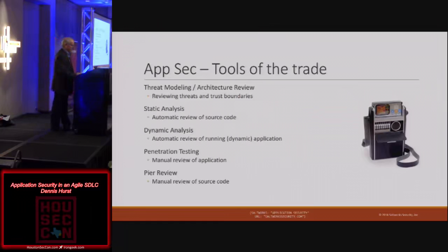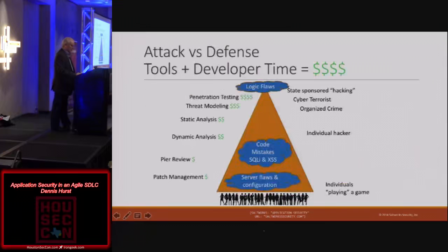The trick with each of these is to understand what is it, how much does it cost, is it something that's practical to integrate? And then decide, is this something we do once or something we do repeatedly? Or for some applications, is it something that we even do at all? So for example, if you have a marketing website, you may not do a penetration test because the cost of it is just too high. Or if it's only internally facing. But that's something you've got to decide as a security team.